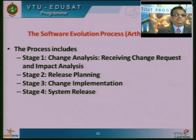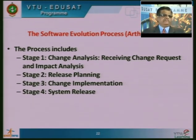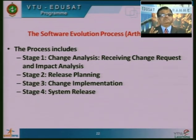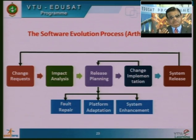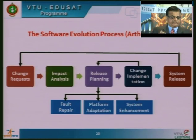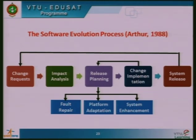The software evolution process works in four stages as proposed by Arthur in 1988. First is change analysis — receiving change requests and performing impact analysis. Second is release planning. Third is change implementation. Fourth is system release. After change analysis, release planning addresses fault repair, platform adaptation, or system enhancement, followed by change implementation and system release.